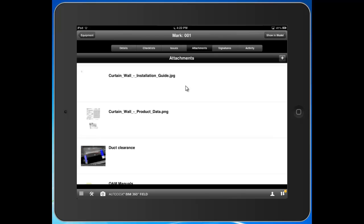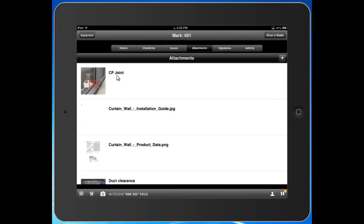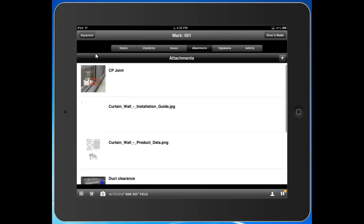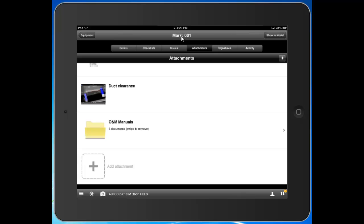Next, during construction. What information do we expect them to capture? Well, they put some of the information here in the details tab. Others they put here in attachments, such as this photo they marked up. Then finally, number three on the back end. What information do we want to put in here that relates to owner handover and operations? Well, you can see here I actually have a folder here with some O&M manuals relevant to this one item.